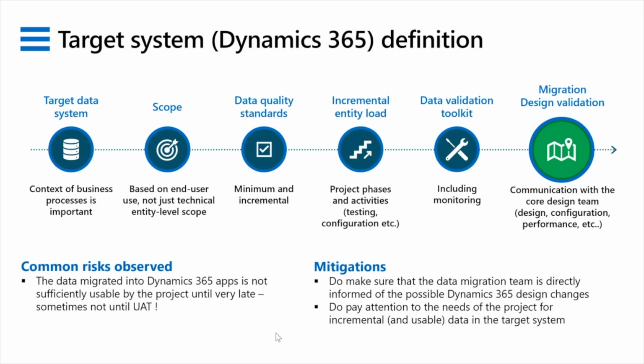It's okay if they're incremental, that you are expected to, for example, with a customer record, get deeper and deeper as you go through the cycles. But make sure it meets some minimum bar and it's not arbitrary, right? That it's meaningful in the target system. It's very important in terms of usability that you think of the breadth of the record before you think of the depth. So it's better to have 20 customer records that are migrated cleanly than 2,000 that you can't use.